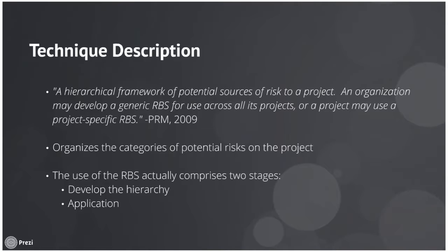The use of the risk breakdown structure actually comprises two stages. First stage is develop the hierarchy, which involves creating the hierarchy itself, either based on past experience or relevant concerns of the organization. Then second is the application. The risk breakdown serves as a source for risk identification, analysis, and reporting.